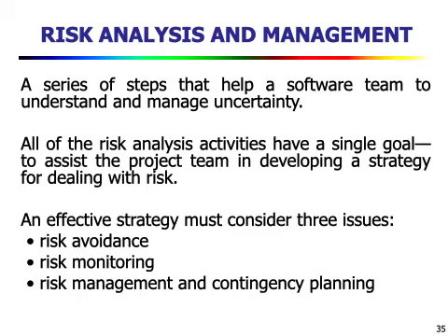And this risk analysis and management goes through different steps. The first step is risk identification, that you recognize what can go wrong. And then in the next step, each risk is analyzed to determine the likelihood that it will occur and the damage it will do if it does occur.